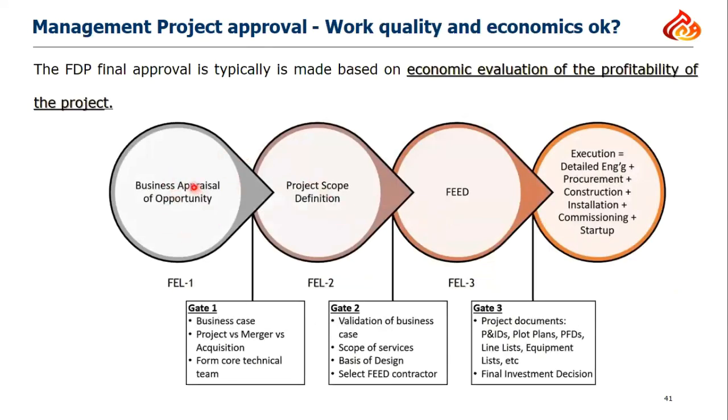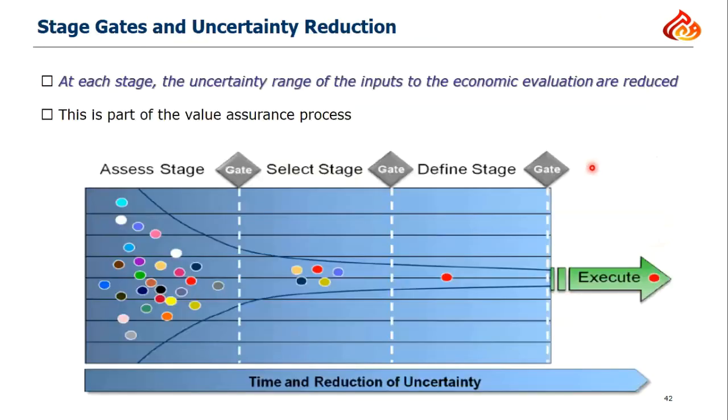So in the planning bar, we come with the first, second, and third gate, and after that we will start the fourth phase after the appraisal or feasibility, concept selection, concept definition, and come up with execution. Execution starts after final investment decision. I will order the material. It will take, for example, 6 months, 2 years, and so on. No matter, based on the plan I have selected. So as a conclusion, we have at the beginning the assessment stage, where I have multiple options.